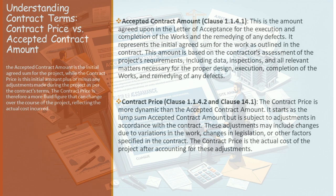First, let's talk about the accepted contract amount. The accepted contract amount is essentially the initial sum agreed upon in the letter of acceptance for the execution and completion of the works, including the remedying of any defects. It's the baseline figure that both parties agree upon at the outset of the project. But here's where it gets interesting: the accepted contract amount is not just a random figure — it's a carefully calculated sum that the contractor bases on a thorough assessment of the project's requirements.